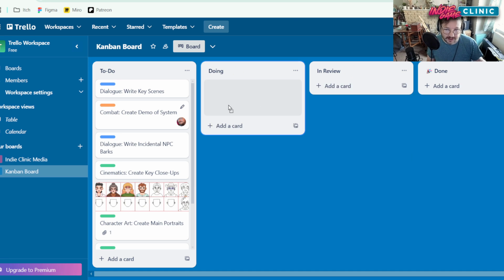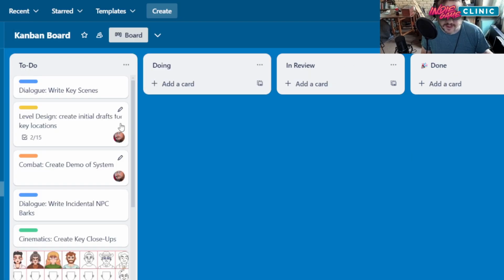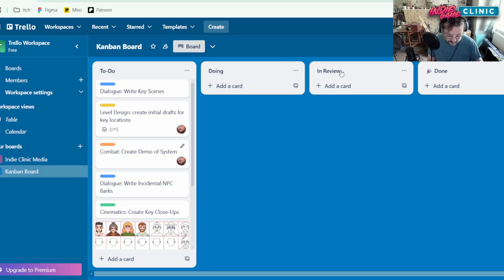So I think generally having these 4 categories and having an in review stage can be really helpful in lots of situations. It can be helpful if you're working with a new team where it's unclear how you work together. It can be helpful if you are working with some very junior people or students and you want to make sure that people just don't go, yeah, finish that, get out of the way, and actually it's not done to standard. Having this 4th column for in review can be really helpful for that.